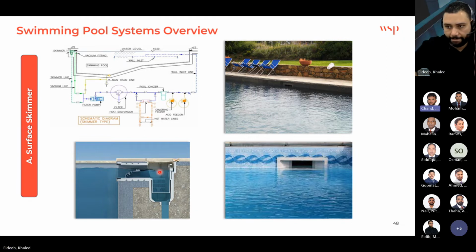Because whenever we are near handing over any project and the swimming pool functionality is on, for the backwater flushing, people don't know where the outlet is going. So the civil teams are running around trying to find where this water is coming from. Do we have any identification? Very good, yes, I will discuss this part specifically because we have been suffering. This is a gap in coordination, a gap in communication between the different consultants.